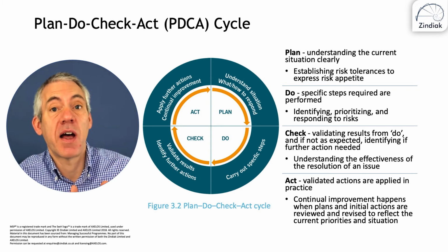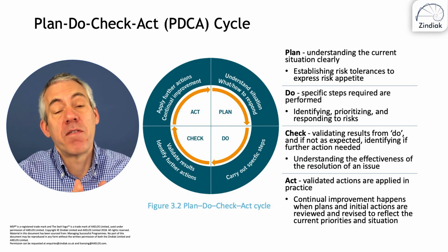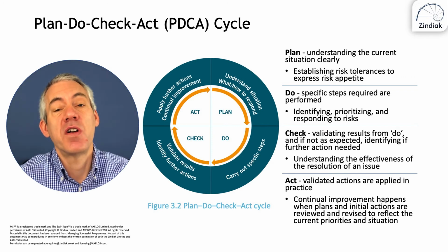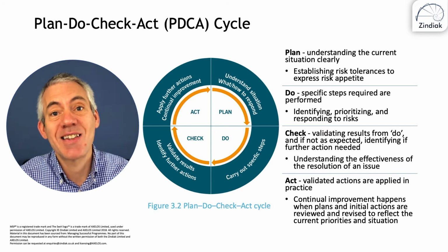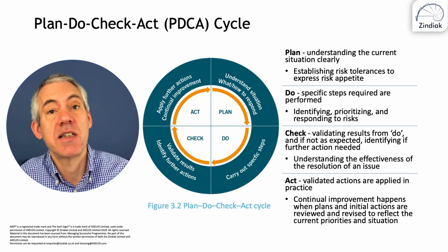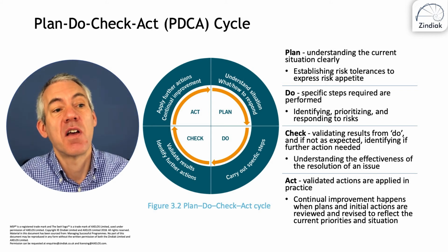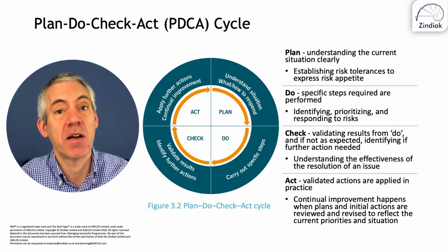The way we do that is we have a risk tolerance. We're prepared to spend, say, the budget's £100,000. The risk tolerance on that is, say, 10%. Might be a bit high, but 10%, it's £10,000. So that's the risk appetite, the amount of risk we're prepared to accept.